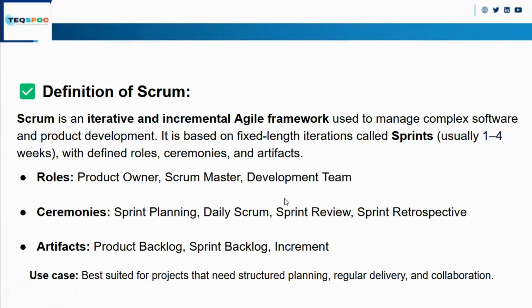Then is the sprint review meeting. Basically, the review meeting is done at the last of the sprint, where the developer will give the demo to the respective client or stakeholder showing what they have completed, and the client and stakeholder give feedback to the developer that this thing you have completed is right, wrong, or anything. This feedback is basically given in the sprint review meeting.